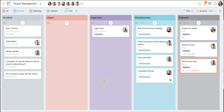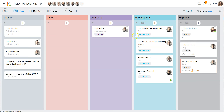In any view, KanBo collects information of all cards and their state of accomplishment, then calculates the percentage of progress. So in this list representing the marketing team, you can see that 25% of the workload is finished. In this list it's 33% because they have accomplished one card out of four. If there are to-do items they will also be considered as work.